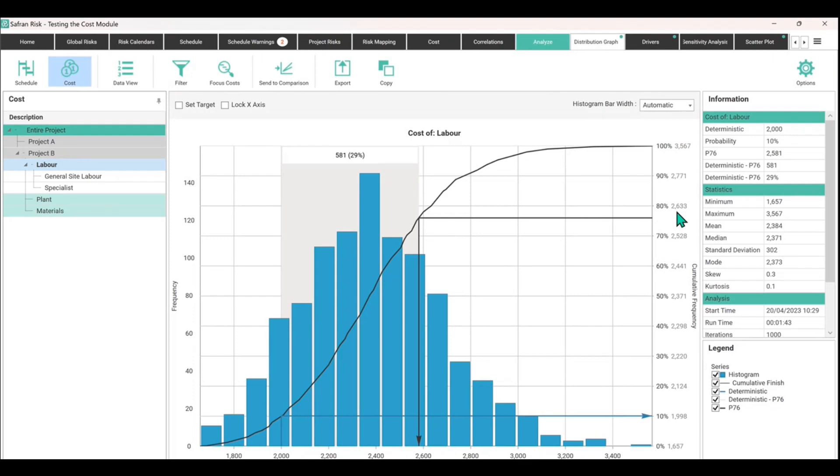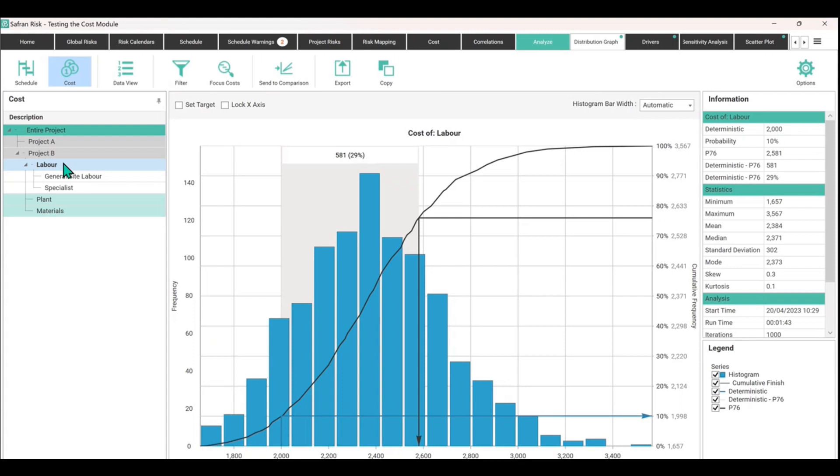That's not how statistical analysis works. That's not how portfolio effect works. So if you want the overall cost for purpose of contingency, then I'd recommend going to the highest level where all these things are summed together in the aggregate. You want to be focusing just on that. Just as a little tip, if you do have a need for looking at the build up of how each sub part of the cost model add into the next part and the next part.